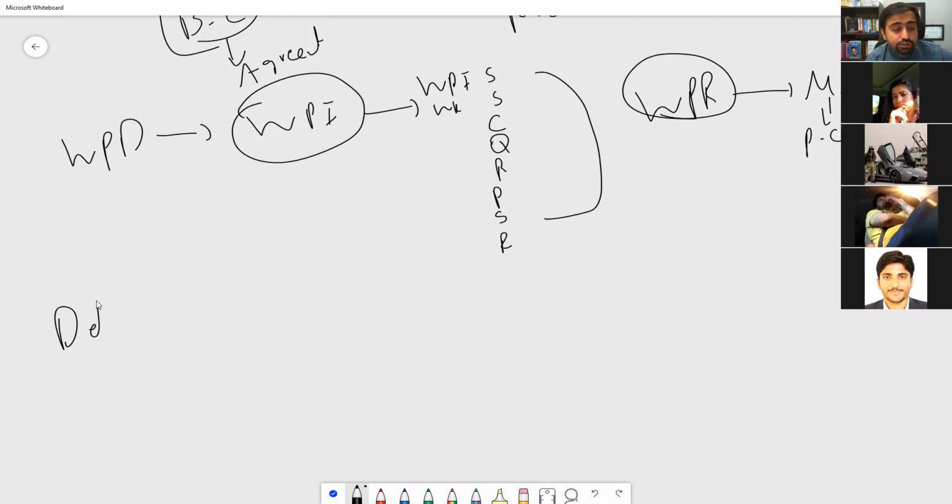Deliverables that were produced directly go to control quality. In control quality, we are checking what was produced according to the agreed plan: is the deliverable good or not? If the deliverable is okay according to the quality management plan, we get a verified deliverable. If not, we make a change request, a preventive action, corrective action, or defect repair.